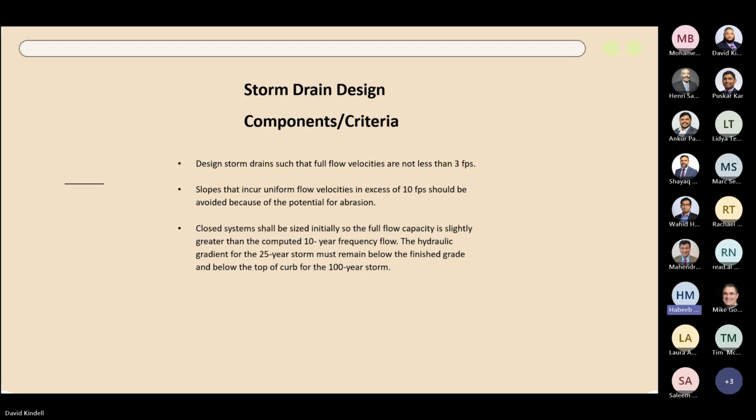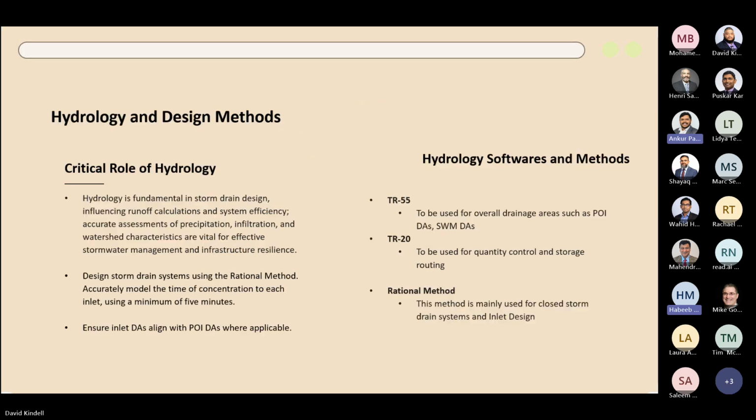All right, thank you. Just one last point on that: whatever we say, HHD is the one that is asking for it in the case we're talking about. I think what they told us for 410 is we just need to video the existing pipe downstream of where we're tying in. So, not the whole 2-mile system or whatever, but just near where we're going to be tapping in. So for that project, Vivo needs to calculate that, and they can probably give you a linear footage or mark on a plan which pipes they need to inspect. Okay, all right, that will help. Thank you.